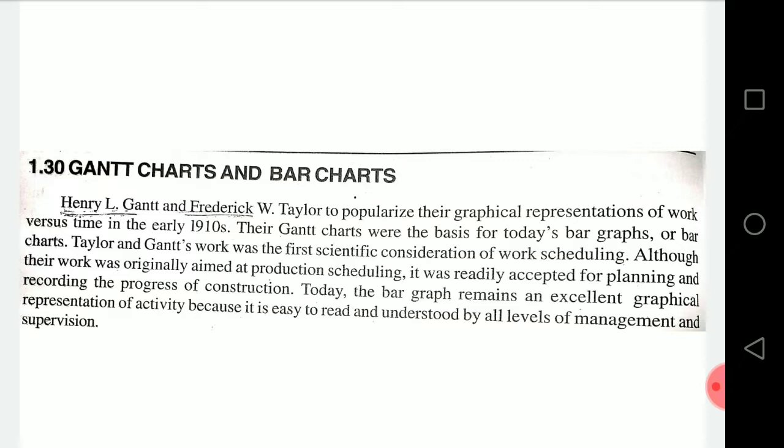Gantt charts provide visual clarity. They are very good schedules for presenting the project timeline to the owner, end user groups, and the public. Such charts are easily understood and do a good job of identifying when things start and when things end, which is what an owner is most interested in. Owners don't particularly care about the relationship between any activities. They are primarily concerned with when the job will be done and what will be the financial concerns.